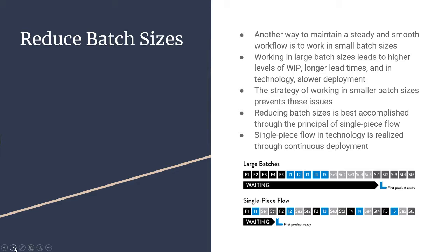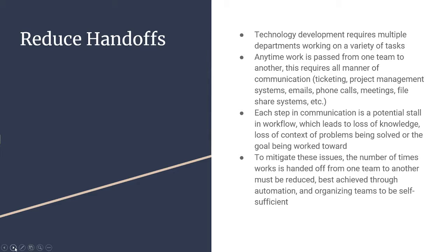One of the examples we have read in the book is that if we create a large batch that is going to take 40 seconds, and we have to come back and resolve it, it's going to take another 40 seconds. Instead, if we take a 5 second batch and we have to come back, obviously it's going to take a shorter time, and it's going to let us focus on what we're doing more efficiently.